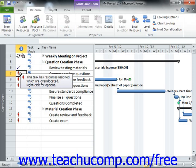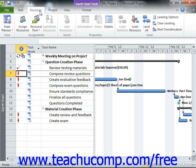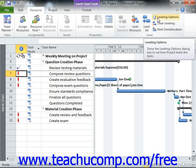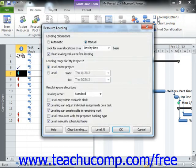To set the parameters used to automatically resolve resource over-allocations, you can click the Leveling Options button that appears in the Level button group on the Resource tab within the ribbon to open the Resource Leveling dialog box. This dialog box allows you to control the processes and guidelines that Microsoft Project will use when performing the resource leveling.